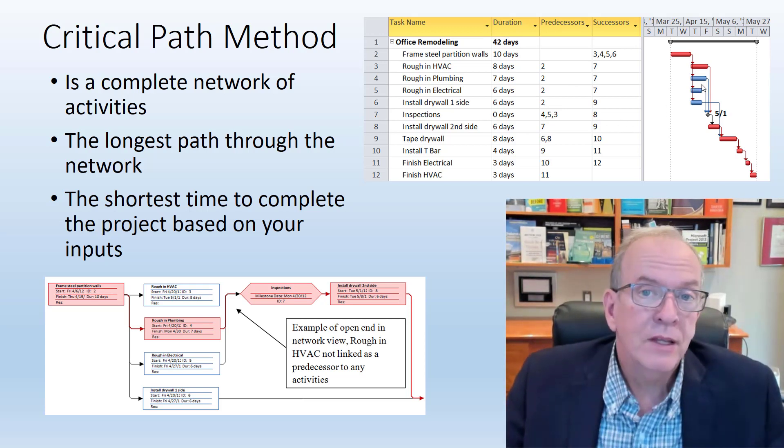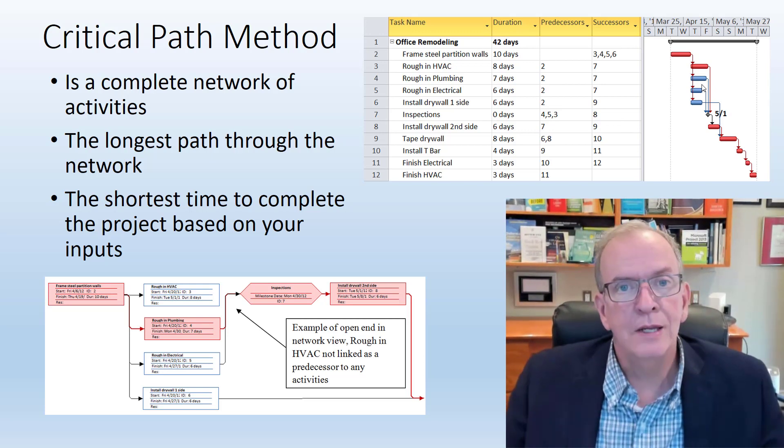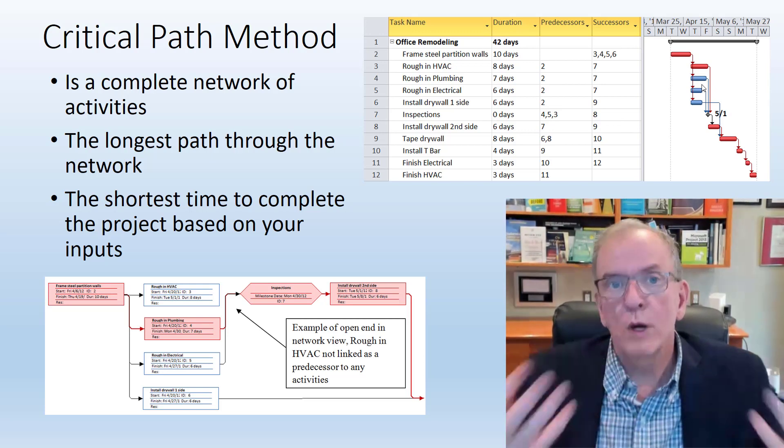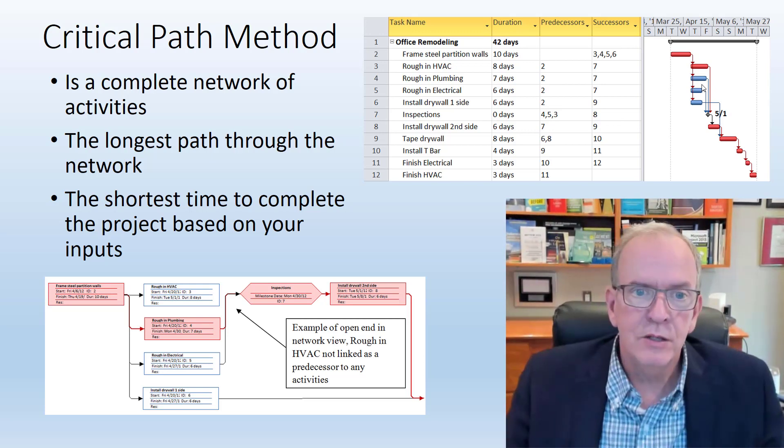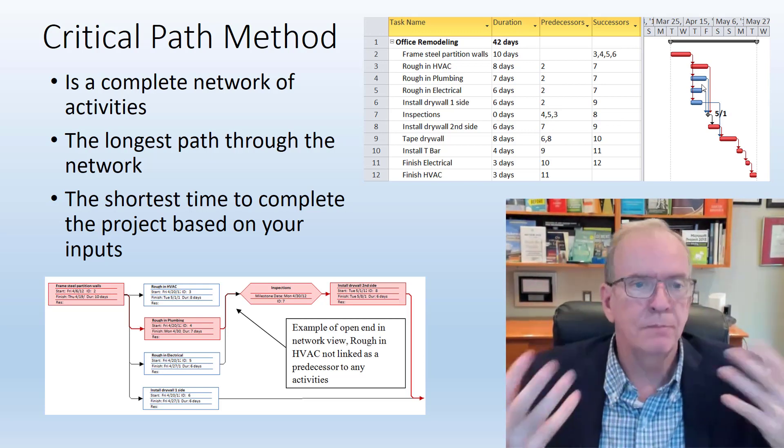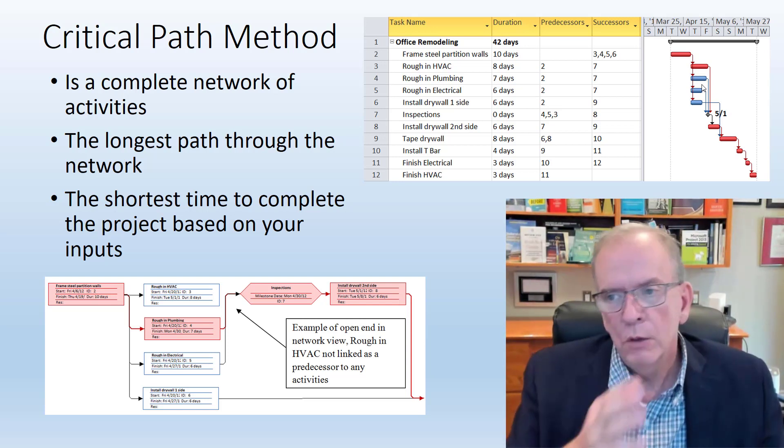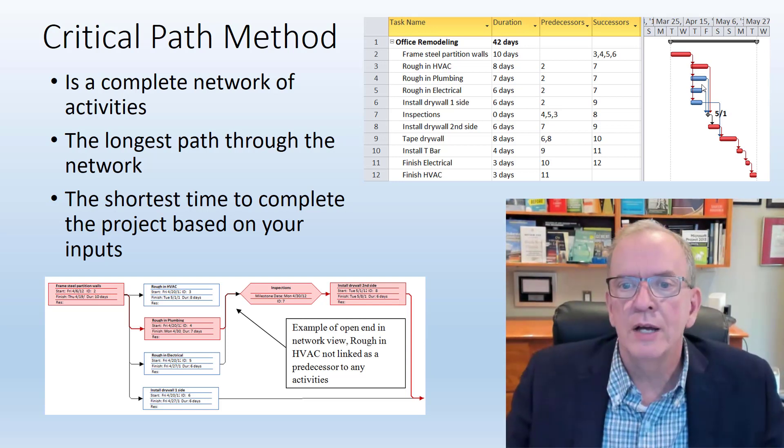The critical path doesn't stay the same when you run a project. It usually changes because something doesn't go the way that you plan. Then it would adjust.